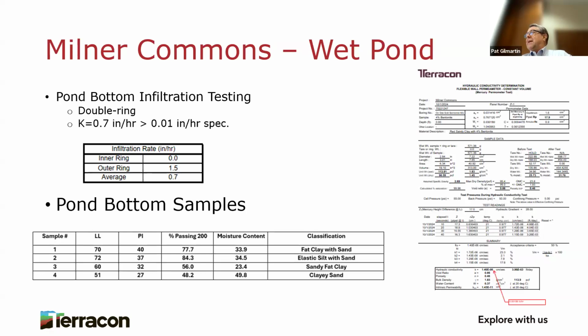The lesson I learned from that was that, to me, the quickest and most technically feasible solution was to just put a geomembrane liner down, without talking to the contractor about cost and schedule. But the answer from the project team was, no, we don't have time to take this thing back and get it re-permitted. We got to get this built, because they needed their CO last week, which I think they have now.